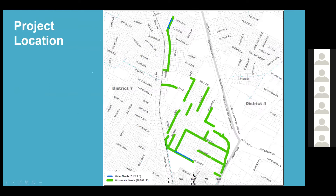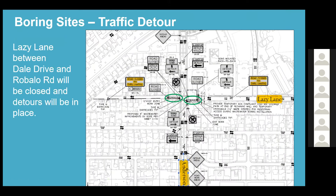On this slide you'll see the project location. The green lines represent where the wastewater needs are - approximately 16,089 linear feet of wastewater lines - and the water lines that are going to be replaced. This next slide shows the places where there will be some boring sites and traffic detours, with the project between Lazy Lane, between Dell Drive and Robolo Road - those will be closed and detours will be in place. Mr. Diego, would you like to go over any of those?